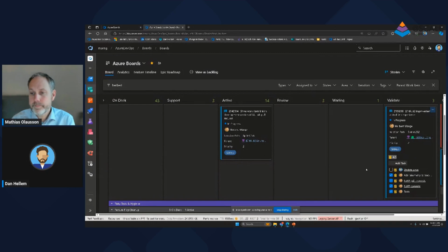We just find that doing the sprint planning with tasks is an extra layer of overhead for us that we don't need. We're having regular conversations about the stories. We're having regular stand-ups a couple times a week where we take a look at things. If a team member wants to break things down into a bunch of different tasks, they can. That's really up to them. But we use them more for checklists. We don't usually use them for anything above and beyond that.